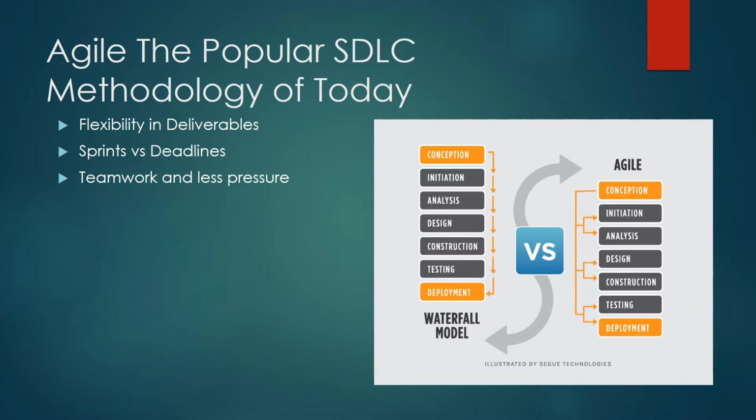The agile methodology is all about teamwork and flexibility. This method moves away from the set schedule and serious deadlines and moves toward a more delivery based approach called sprints. A sprint lasts a period of time with set deliverables that should be complete before the next sprint. Sprints make costs predictable and outline the expertise needed from the team. Deliverables are determined by the customer.